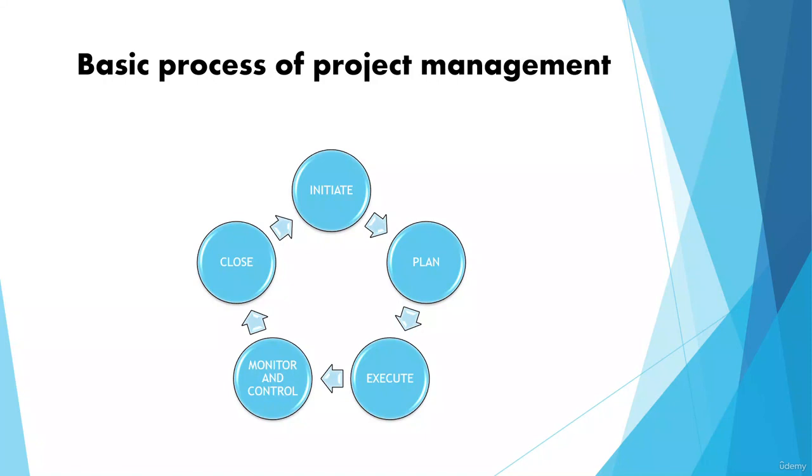After developing the charter, the project manager presents it to the leader or the sponsor of the project for approval. With that approval, the project manager and the business analyst gain the authority to employ the organizational resources and people to conduct the work. A business analyst plays a vital role in securing the confidence and trust of the project sponsors.